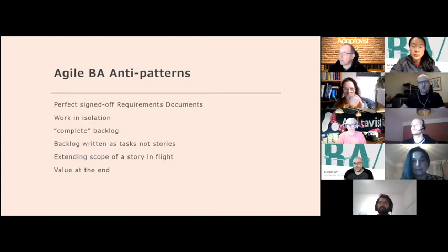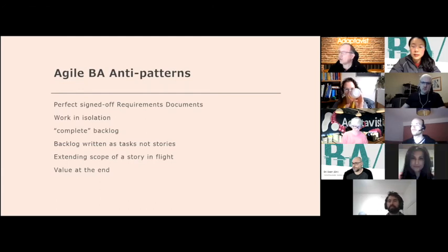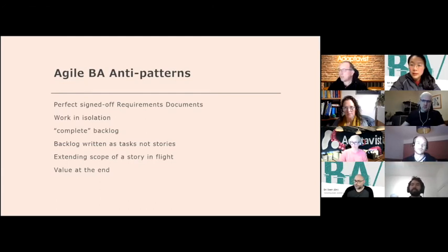There is another question, which is around managing too much change, especially increasing the scope of the current story, versus being agile. Very simple. If the scope change can be covered in the time and the complexity that you've estimated for the current sprint, and it makes no difference to the current sprint, it's just a different way of doing something, hopefully a better way, then go for it. Do it in the current sprint.